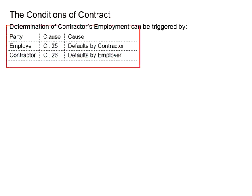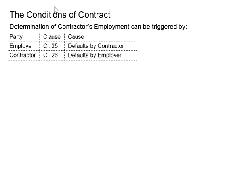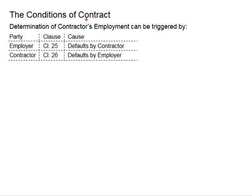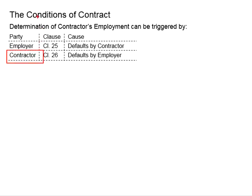We are talking about the determinations of the contractor's employment. Who is the person to trigger this? Clause 25 is about triggering the determinations of the contractor's employment by the employer — this happens when the contractor is at default. In Clause 26, it will be the contractor who decides to terminate himself from the project. This happens when the employer is in default.